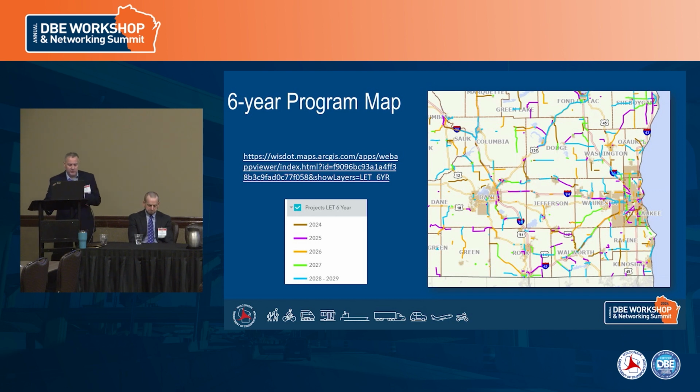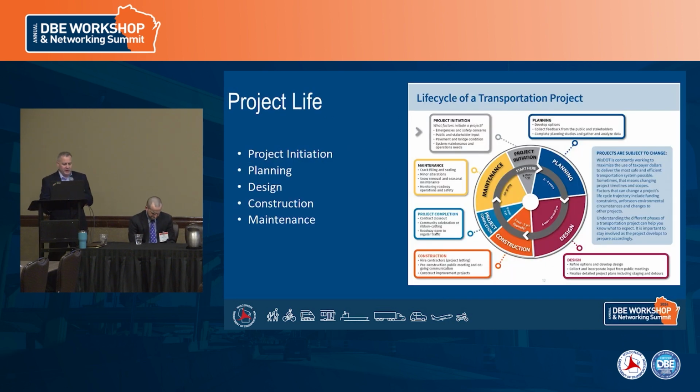So we'll see if we can get that up later before we're done with the presentation and after the panel discussion. But then the last slide I just want to talk about, this is a little hard to see. You're not going to be able to see everything, but it gives you an idea about the time frame of a project. So when it's in planning, we're typically looking at projects that are 6 to 8 years out when we initiate them into the program. So it'll be in that planning phase and scoping of the project phase for up to 4 years.